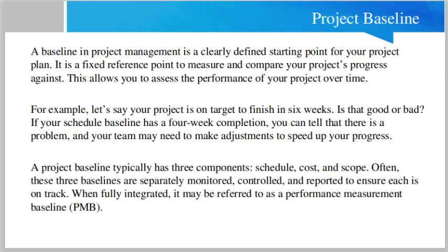Now what does that actually mean? For example, if you are starting a project, and you set a baseline that you must complete that project within 6 months, and you have completed this project within 5 months, that means you have completed the project on time. Similarly, on the other hand, if you set a project baseline of 6 months and the project was completed in 8 months, that means you have taken overtime, and you have not completed the project on time, which means that project performance is not good. So basically this is the concept of baseline, to compare and evaluate the performance of a project.